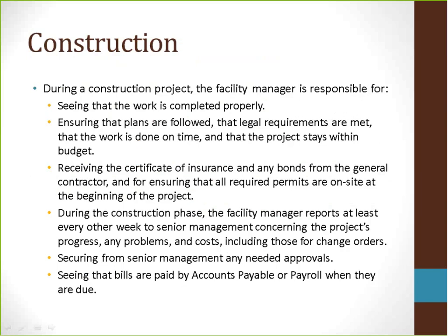During a construction project, the facility manager is responsible for seeing that the work is completed properly, ensuring that plans are followed, that legal requirements are met, that the work is done on time, and that the project stays within budget. Also, receiving the certificate of insurance and any bonds from the general contractor, and ensuring that all required permits are on-site at the beginning of the project. During the construction phase, the facility manager reports at least every other week to senior management concerning the project's progress, any problems that have occurred, the costs including those for change orders, securing any needed approvals, and seeing that bills are paid by accounts payable or payroll when they are due.